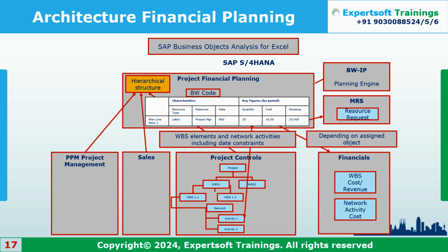Okay. So unit costing will do, right? DPO, base planning object. You can do unit cost planning also, but that is all done under your PS projects. From PS projects, you're transferring data to your CPM. The financial planning you are doing goes from PS to CPM. I am saying CPM to PS because that's the reason we are taking all this analytical offering. PS doesn't have that much flexibility compared to CPM projects. You can do all the data modeling as per your business requirement, and all sorts of calculations.